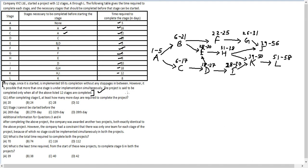Question 1: After completing stage E, at least how many more days are required to complete the project? Stage E finishes on day 30 and the total project takes 58 days, so 28 more days are required — the answer is 28. Question 2: Stage J cannot be started before day 39, so the answer is option D.